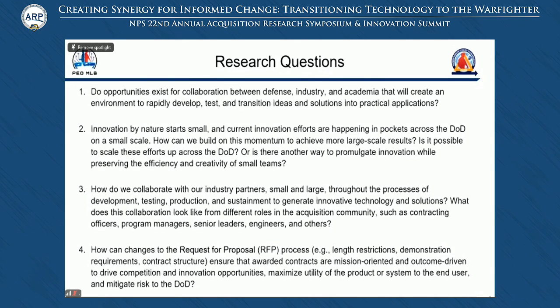And moving to number 4, the use of OTA success criteria, which I'll discuss later in the brief, and our agile methodology ensures OTAs are mission-oriented and outcome-driven. We do this through firm fixed price modular contracting. In TIFRS 2.0, the OTA payment milestones are tied to each sprint. And for C3 AI, Models Modernization, they deliver new production capability every 6 months. This mitigates risk to the DoD by ensuring we continue to receive quality while also having the ability to adjust our priorities that are given to our customer at M&RA.